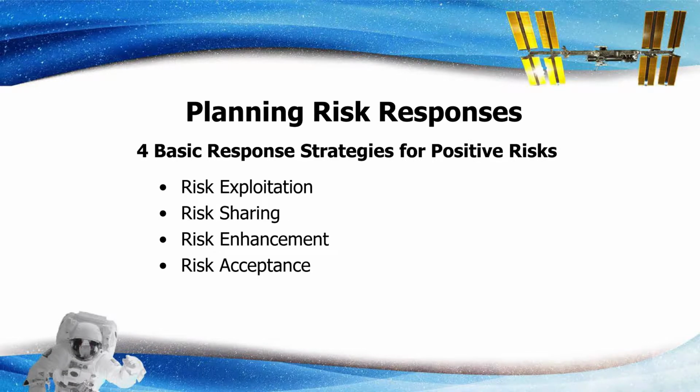Four basic response strategies for positive risks are risk exploitation, or doing whatever you can to make sure the positive risk happens; risk sharing, or allocating ownership of the risk to another party; risk enhancement, or changing the size of the opportunity by identifying and maximizing key drivers of the positive risk; and risk acceptance, which also applies to positive risks when the project team does not take any actions toward a risk.